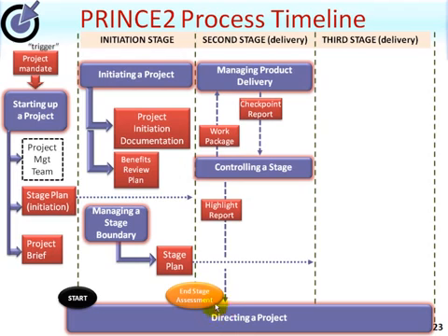Remember, the project board are following the principle of management by exception, and provided the project manager can see that the stage is set to complete within tolerance bounds, then the only regular report the project board will receive is this one, the highlight report.